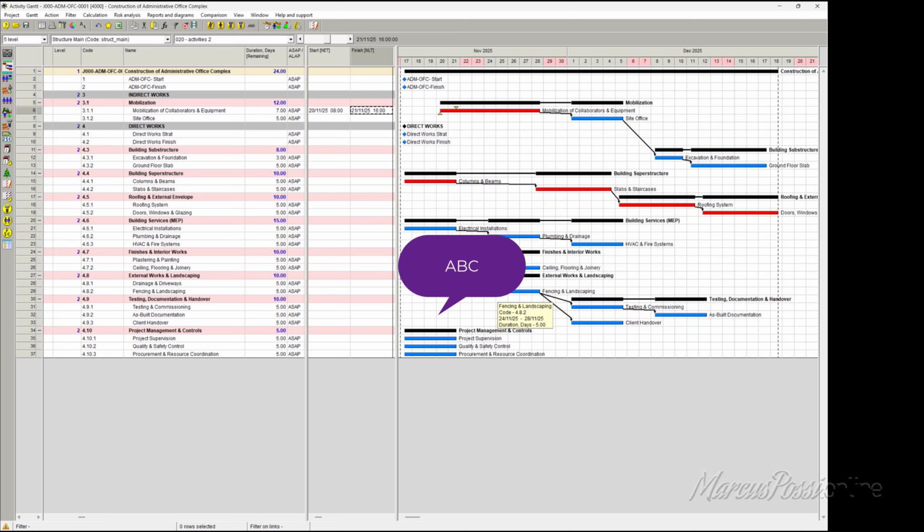Instead of finish-to-start, you want to make a different way of linking. Like start-to-start, but it starts from somewhere in the middle. The way I showed you is the easiest way to link.